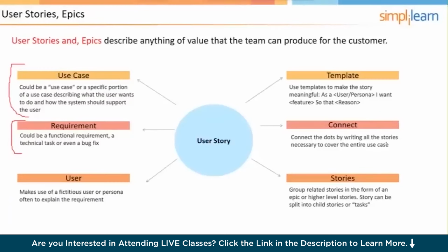And so the priority of the user stories in the product backlog, while it might start with just being simple functional user stories coming from the product owner, will evolve until it includes some other things that are also considerations when it comes to priorities, because of successor, predecessor relationships, dependencies, and things like that.